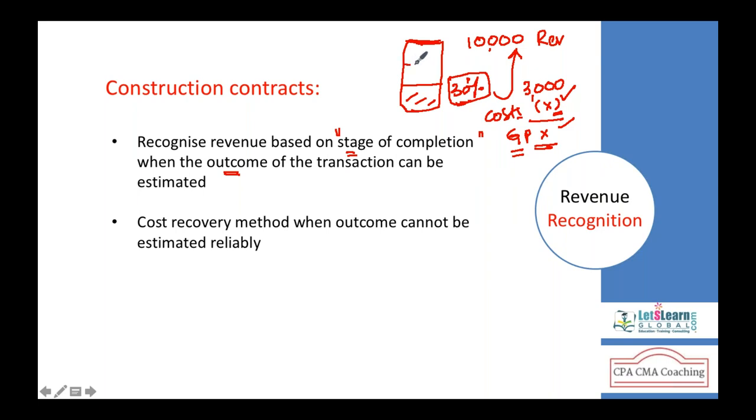In the second year, the progress will be 30% plus something, so we construct a little bit more here. Say for example, so far we completed 42% from the inception. So in year two, the degree of completion is not 42%, because in year one we completed 30%, upon which we worked and it reached 42%. So in year two, the degree of completion should be 42% minus the 30% already completed in the first year. So the degree of completion in year 2 was only 12%.